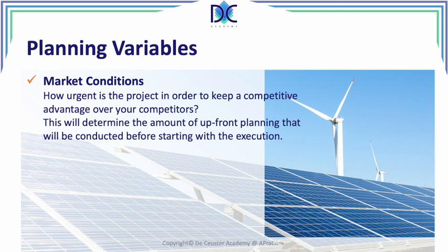Now, we also have to look at the market conditions when we look at the upfront planning. When we have the time, when there is no competition going on, we can take all the time for our planning. But when we see that our competitors are also pushing different products that could compete with our product or service, we may have to reconsider the type of planning, how much upfront planning we will need.